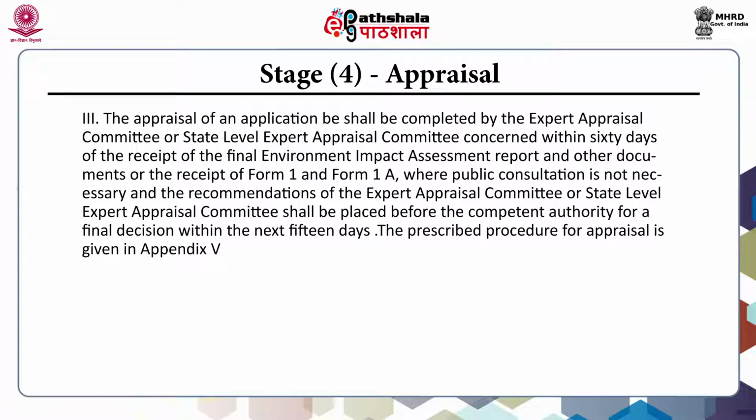The appraisal of an application shall be completed by the expert appraisal committee or state level expert appraisal committee concerned within 60 days of the receipt of the final environment impact assessment report and other documents, or receipt of Form 1 and Form 1A where public consultation is not necessary.